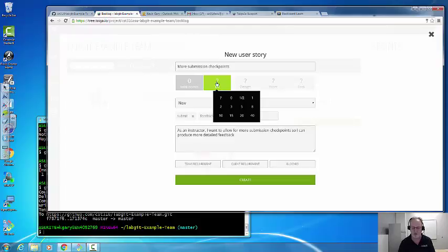Personally, I just picked the first one, user experience. Under there you can see, you can leave it unknown. You can have it a 0-point story. We'll talk about some of the value in doing that. And then you see these relatively incrementing sizes: 1/2, 1. 1 is twice as big as 1/2. 2 is bigger than 1. And so forth. It's kind of pseudo Fibonacci up until you get to 10, 15, 20. So you get to pick a relative size. All right, this is our relative sizing we talked about in the lecture notes. I might say that this is pretty important to me. Not top importance, but pretty important. So I'll assign it 15.